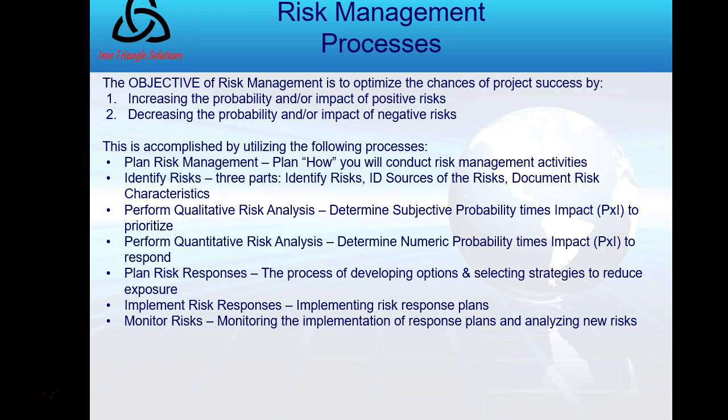Remember the formula PERT, for Program Evaluation and Review Technique. There was beta and triangular, and beta, which is more conservative, is the optimistic plus 4 times the most likely plus the pessimistic, divided by 6. That's actually a risk management tool, meant in cost or schedule management to reduce your risk. So we've been talking about this for a long time, and we want to optimize the chances of success. That's what PERT was really doing for you.